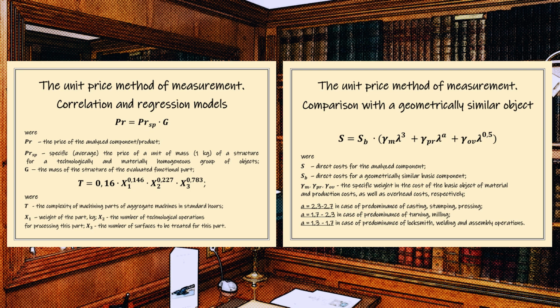This calculation at first glance will look relatively simple, and in fact will be a calculation based on a set of proportions, i.e. if 1 gram of a hypothetical drone frame costs 50 cents and this one weighs 20 grams, then for a hypothetical drone under development with a frame weighing 25 grams, the price will be $12.5. The simplicity of this calculation is initially captivating and is the reason for the conclusion about the absence of the need for visualization voiced above.